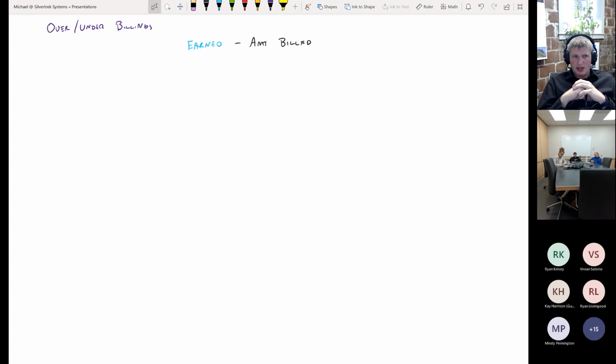So this next little bit here is showing you the work in progress schedule. Typically, the one I use is the JC work in progress with overrides report inside of Vista. That's just JC reports, JC work in progress with overrides. That one is a very simple report that looks a lot like the one I'm going to draw out here on the whiteboard. But there's other ones in there as well that do all of the same thing. They use these same calculations as percent complete to get our earned revenue.